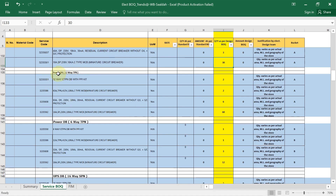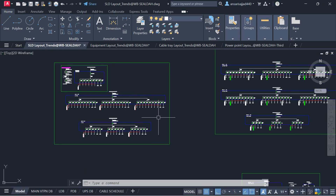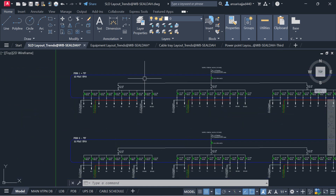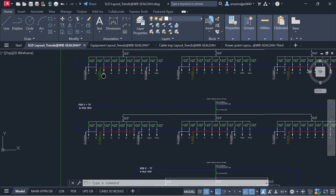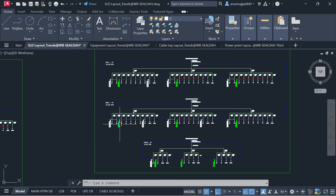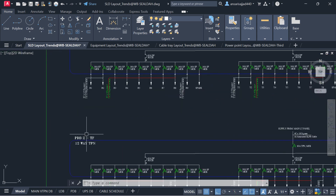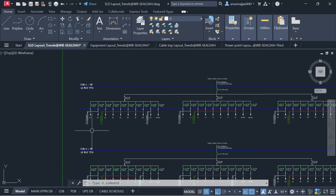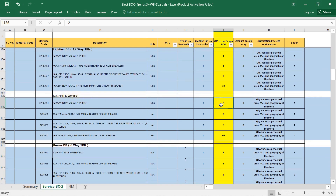Same way for the power DB. We have power distribution boards — open the SLD layout and you will see two 12-way TPN DBs and one 6-way TPN DB. For the power DB 12-way TPN, the quantity is 2. In the Excel sheet write down 2 for the 12-way TPN DB. Then check the 63-amp TPN MCB quantity.